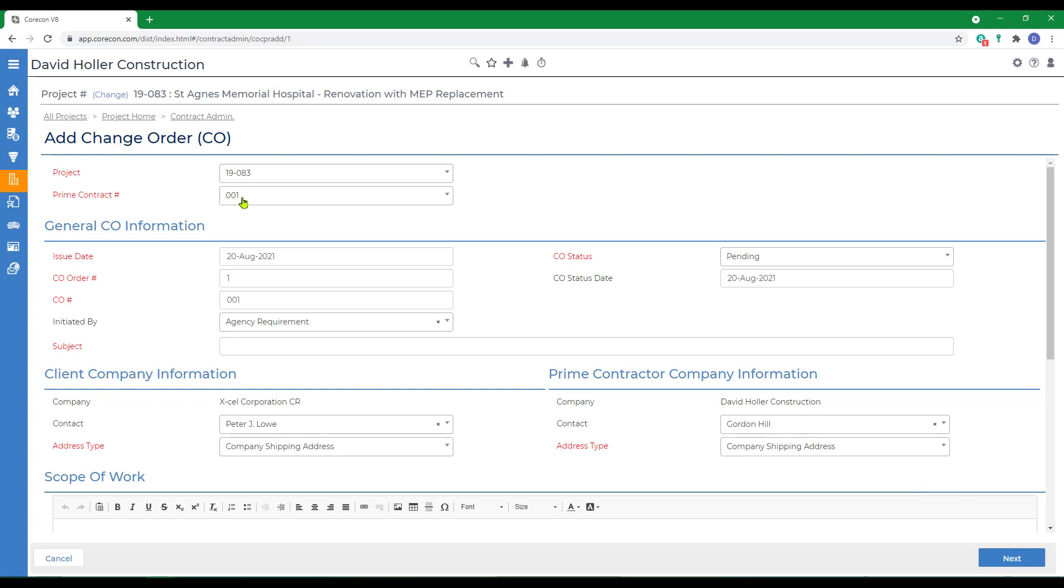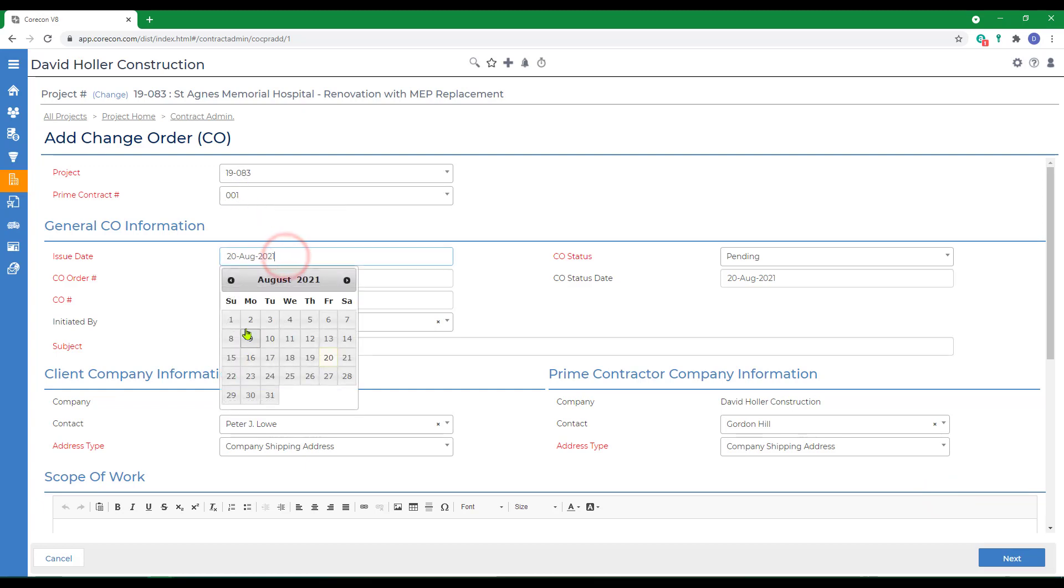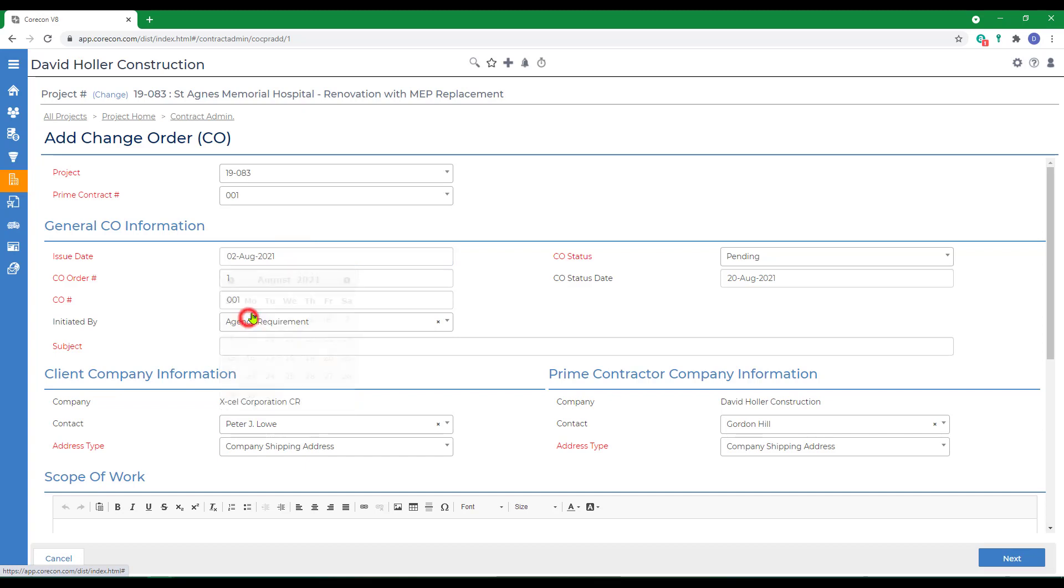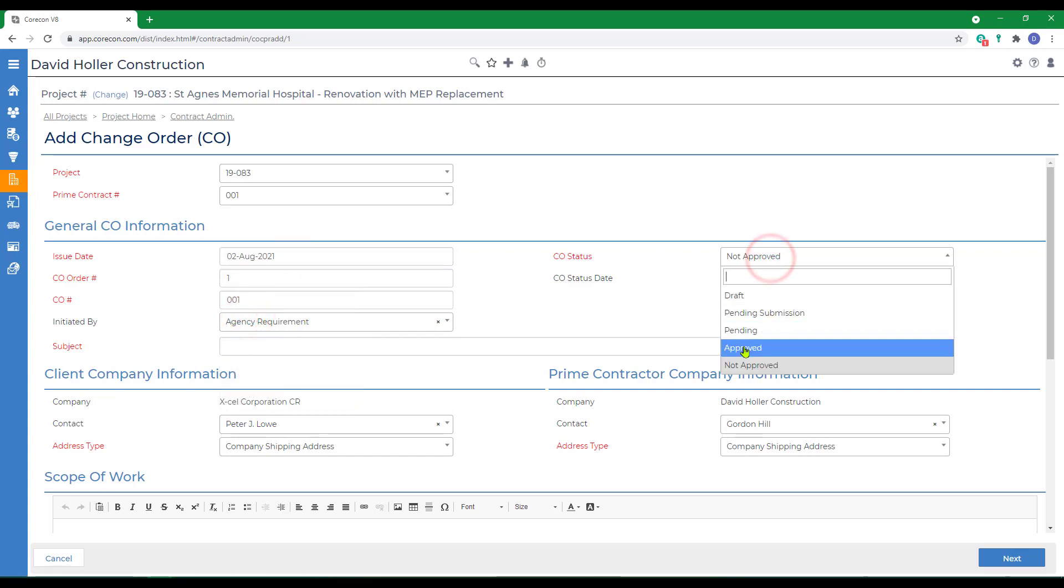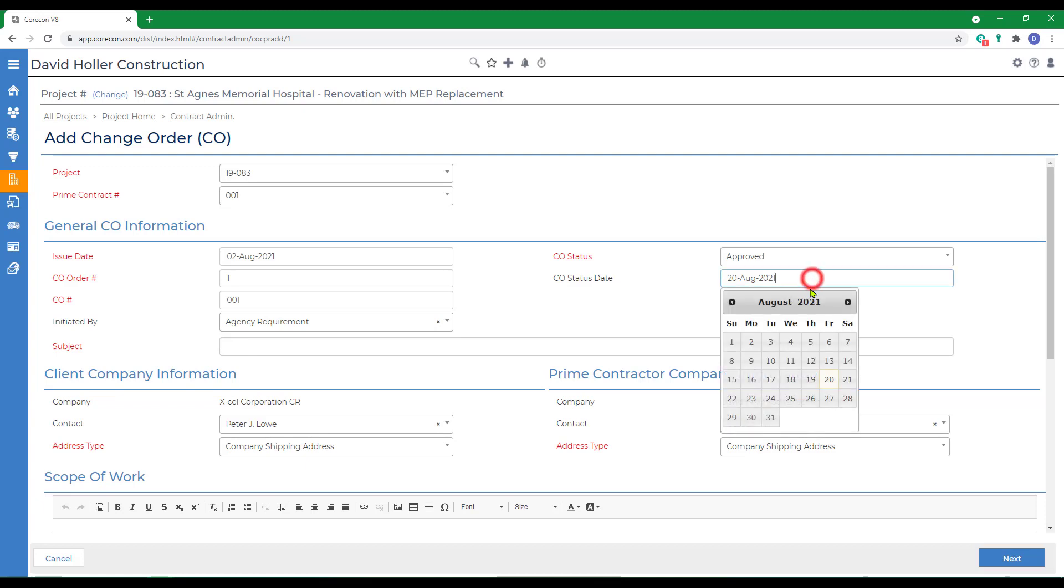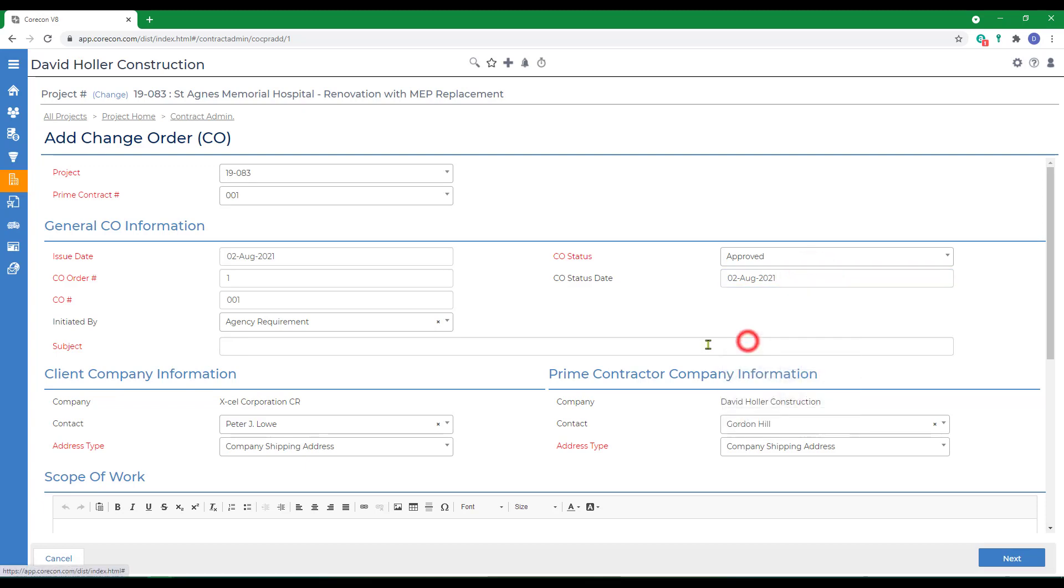The project and prime contract have already been tagged. We'll set the issue date. Mark this approved so that it does affect the project financials. We're also going to give it a status date. Usually, the change order status would remain pending until your customer or project owner has approved. But in this case, we're going to mark it approved.